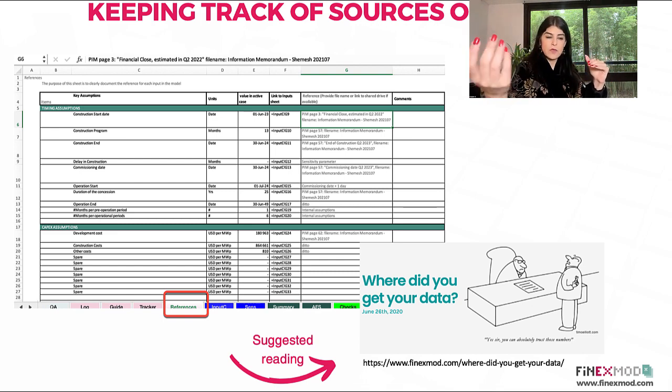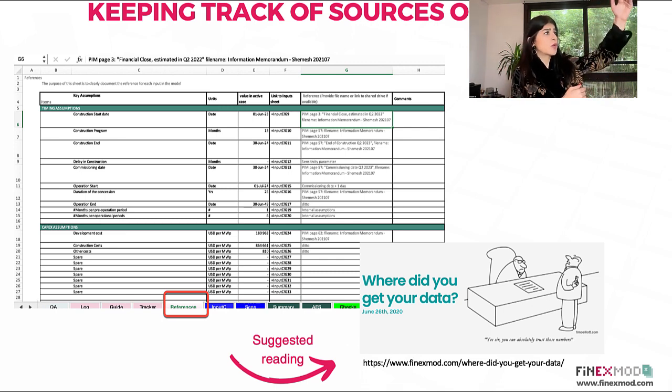And why is that? That's a very good question to ask. Then they will come up and tell you why, because maybe the project is in a very remote area, or maybe the project you considered as benchmarking was run of the river, and the one you are reviewing is with a dam, which is much more expensive.